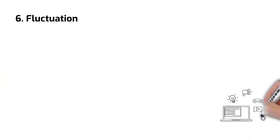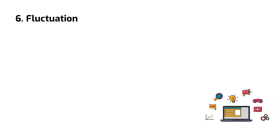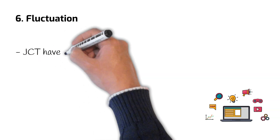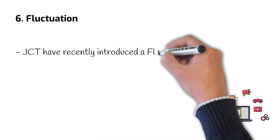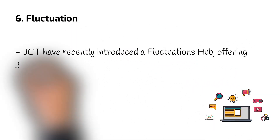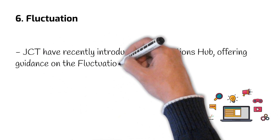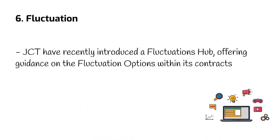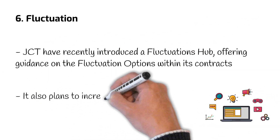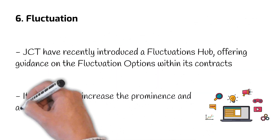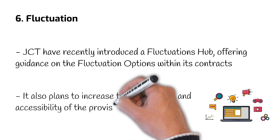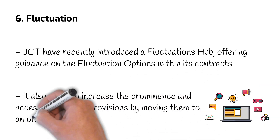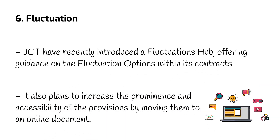Number 6: Fluctuation. Price uncertainty has been one of the key issues facing the construction sector in recent years. JCT has recently introduced a fluctuations hub, offering guidance on fluctuation options within its contracts. It also plans to increase the prominence and accessibility of the provisions by moving them to an online document.